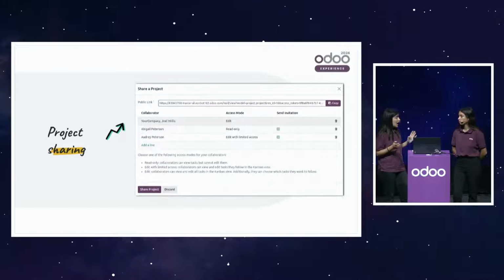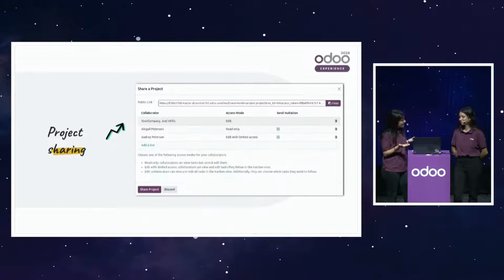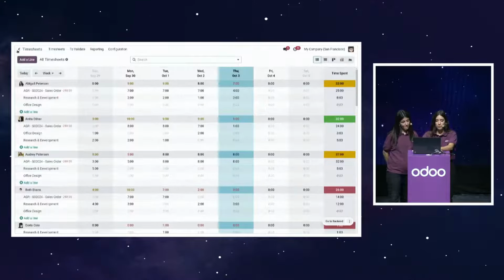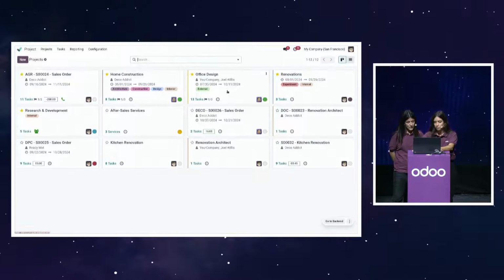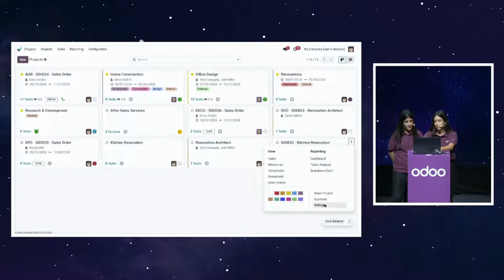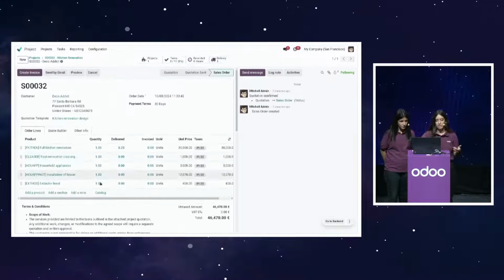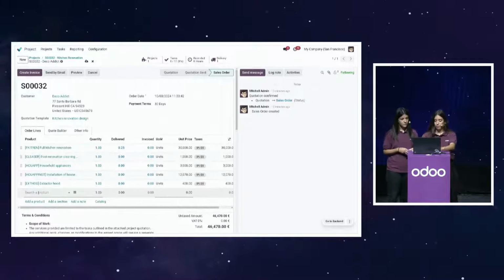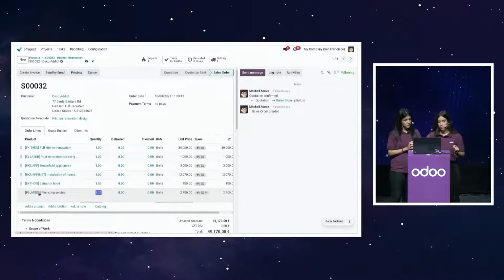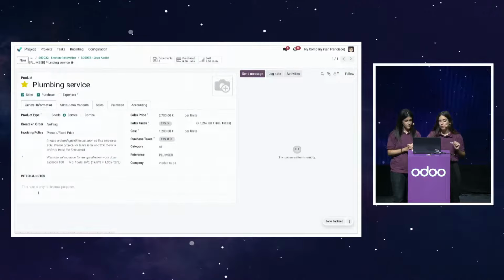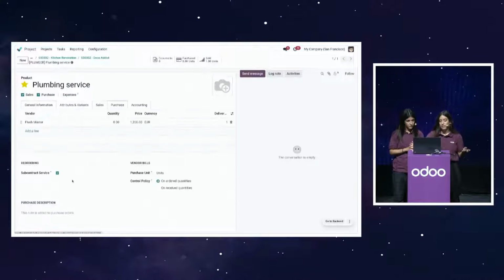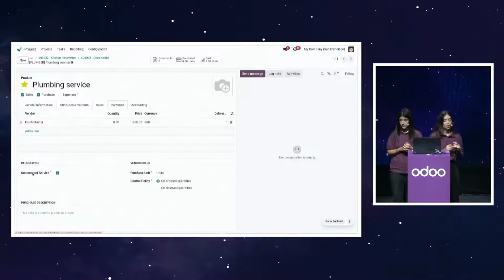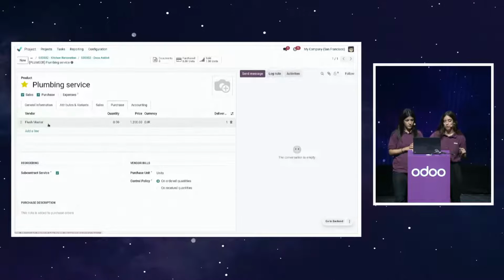As I said, a bit of theory is okay, but Barbara, can you please show us how it works in our database? Of course. For that, let's go back to the project. And I'm going to go to our original sales order. I'm going to add one extra service on this sales order. It's our plumbing service. If we go to the configuration of the service, you'll see that the subcontracted service feature is activated. Don't forget to also add the vendor on the purchase tab.